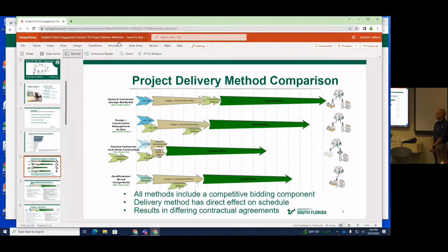There's another approach that's really good for smaller projects where you're just replacing a piece of equipment. It's called job order contracting. Basically, it's a service that surveys construction costs across the United States and then modifies that for a locality. And you can hire the contractor based on, this is what this project ought to cost. Those costs are adjusted on an annual basis, and then you just go in and say, this is it. So it's a very quick way to get to completion. You don't really have a lot of design, you're just replacing equipment.